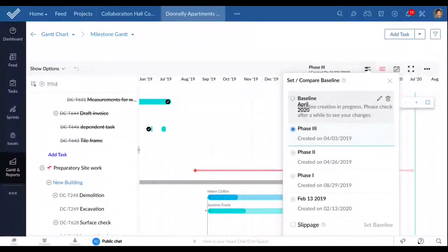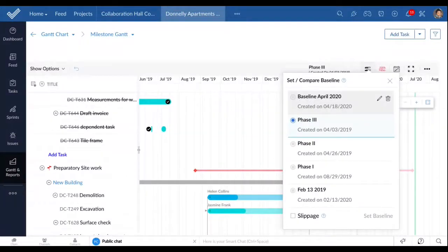According to me, I see baseline this way. It is the only feature in projects or in project management for that matter, which can be created and not be used immediately. You cannot put it to use immediately. That is the nature of a baseline because a baseline is the benchmark that you set. So it is just going to capture the instantaneous status, the overall status of the project. It is going to just freeze, take a screenshot of how well the tasks are placed on the Gantt. So how the tasks are scheduled at that moment.